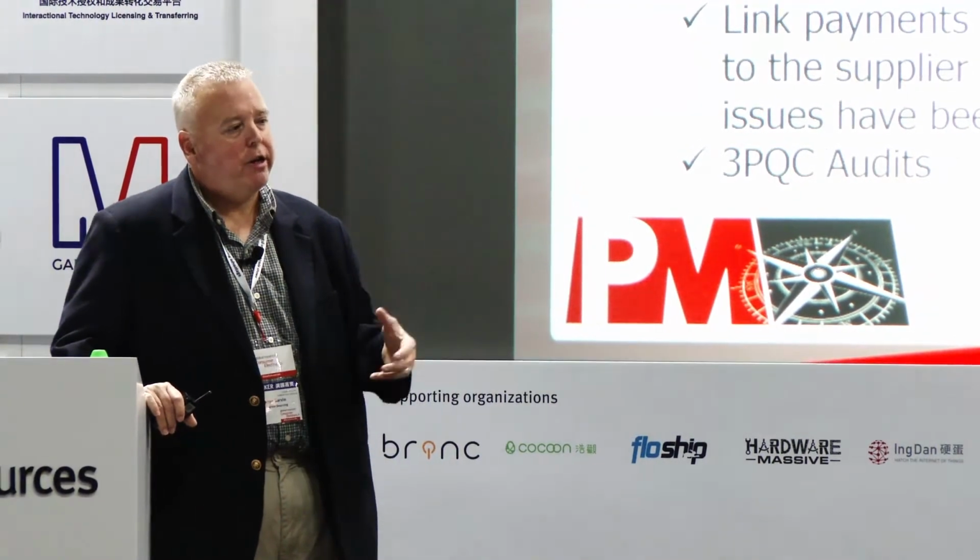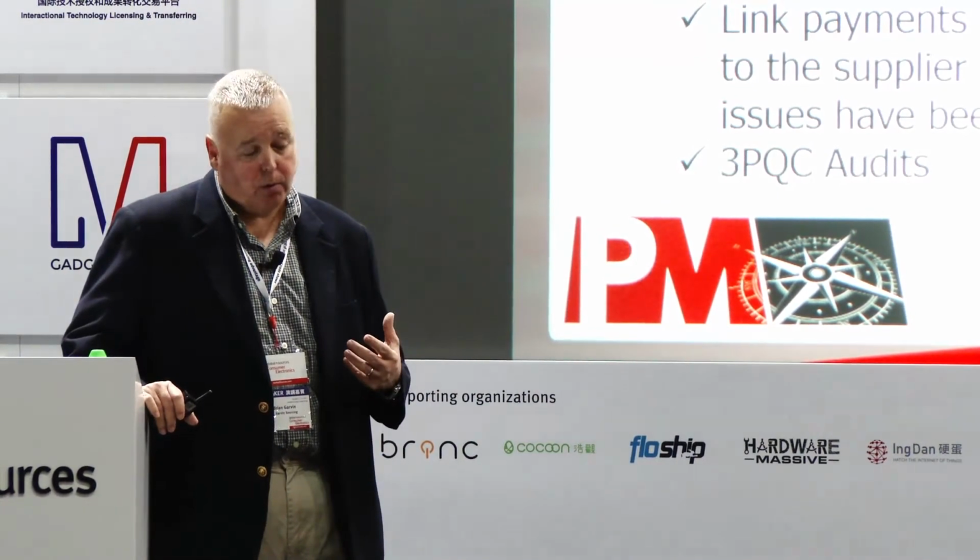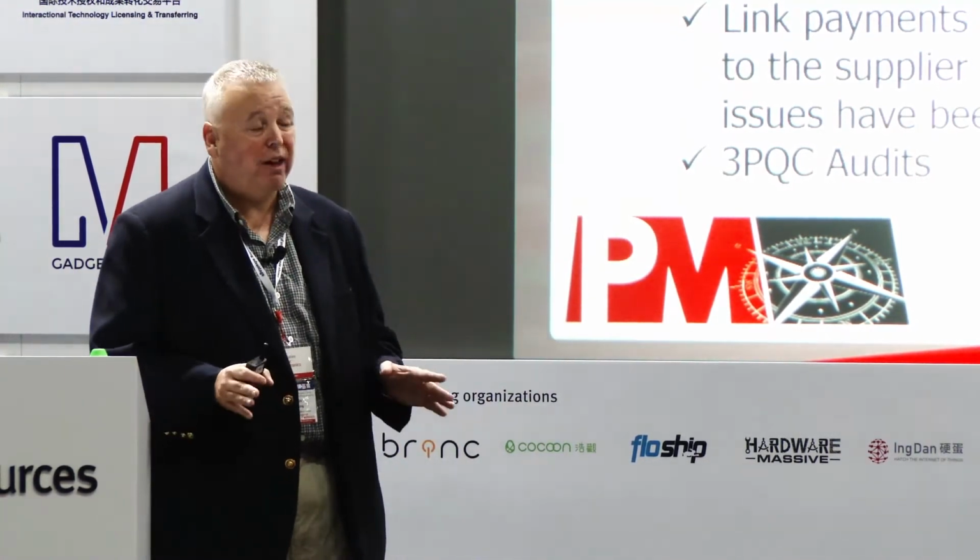And as I said before, when we have the payment terms, the quality and the functionality of your product is clearly tied to those criteria and milestones. Never pay full payment until the product has been inspected and verified, and you're completely happy with the performance of the product. Because as I said, no safety net, and once it leaves China, it's virtually impossible or cost prohibitive to bring it back for rework or replacement. Or it's going to cost you time and money, and it may cost you with your customers. So once it leaves China, it's too late.